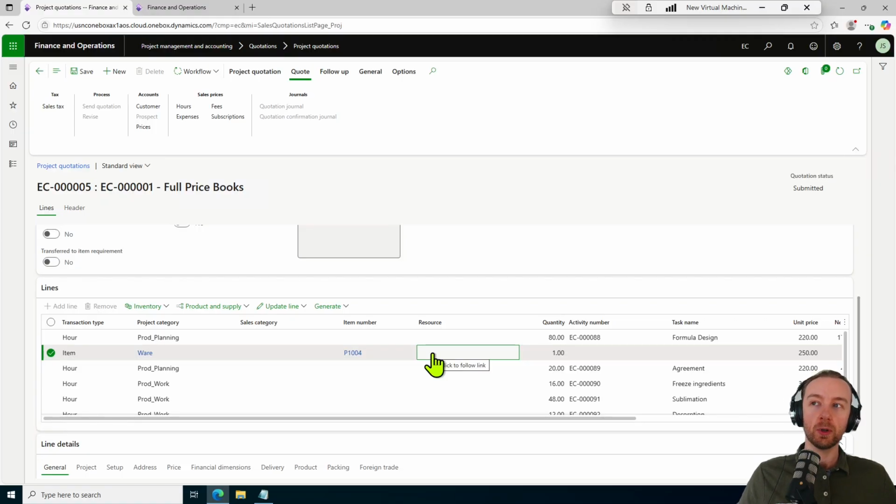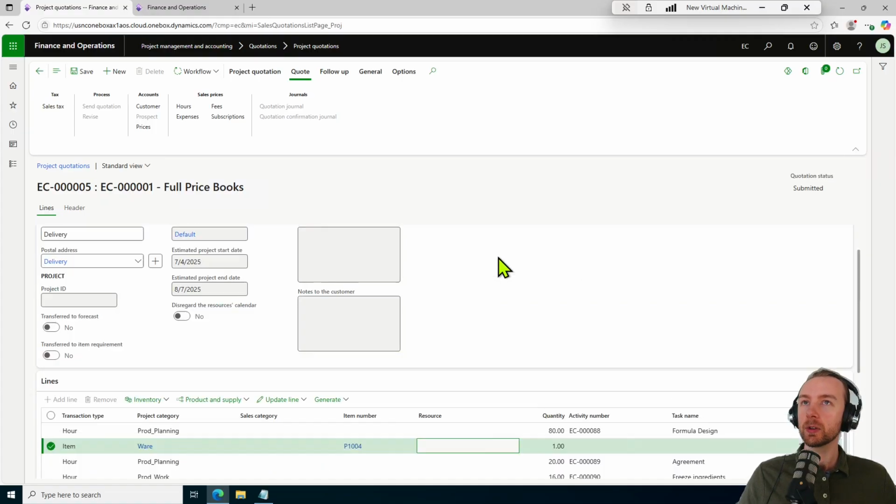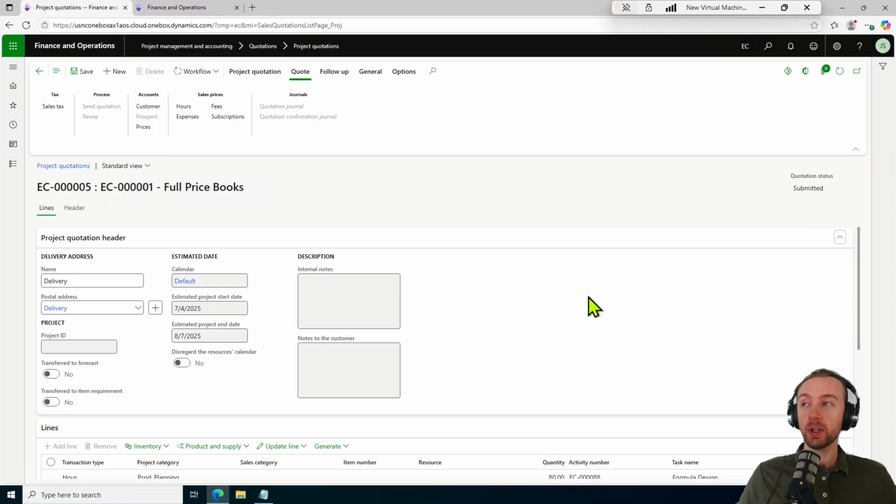If we can invoice alternatively through the project itself for this item, then we can be using fixed price. But fixed price makes it pretty hard to use that invoicing functionality on the sales order. That's just a little something that isn't obvious at first, but can cause problems later on. Okay, so I'm going to take this through the workflow and be right back.